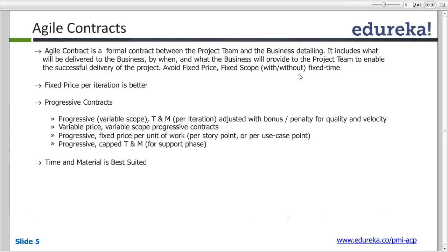Another approach is progressive contracts. Progressive contracts are ones where we can have a variable scope or a Time and Materials (T&M) kind of project, which again should be based on per iteration. We cannot gauge the complete project when we are working in Agile, since we accept change. So even if working on a T&M model, it should be based on each iteration.